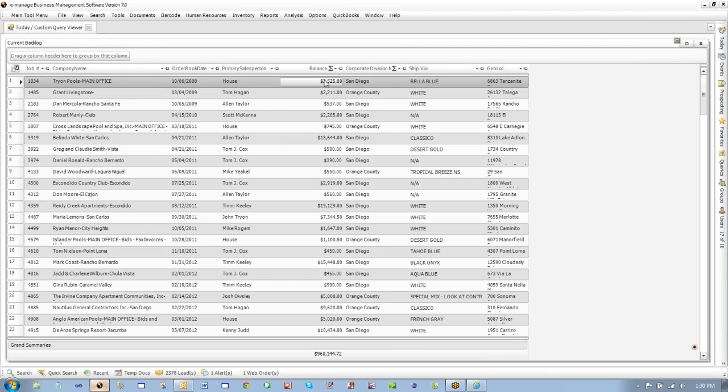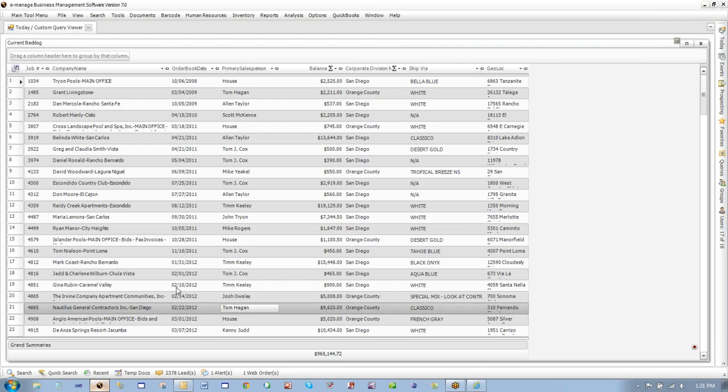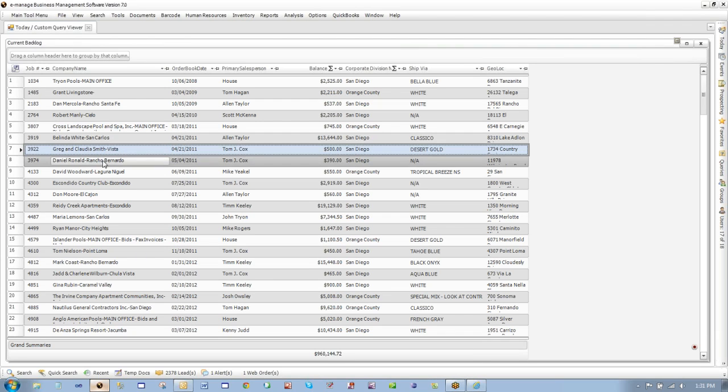Okay, here's the thing about a backlog. Your sale price might be $30,000, right? But you might have already billed for $18,000. So the balance is really what your backlog number is. So really the backlog is the amount of money you're expecting that you've got out there to still invoice for. And that's this number here.